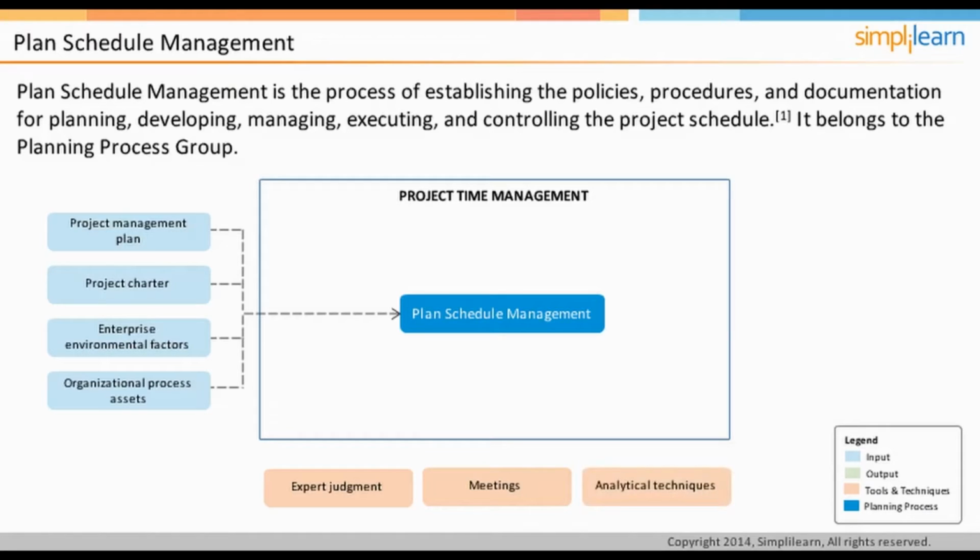Several analytical techniques may be used to determine the schedule management plan. These may include different planning approaches and philosophies, such as rolling wave planning, or different scheduling software that allow to build what-if scenarios, and study the effect of advanced scheduling techniques like leveling, fast tracking, and crashing.